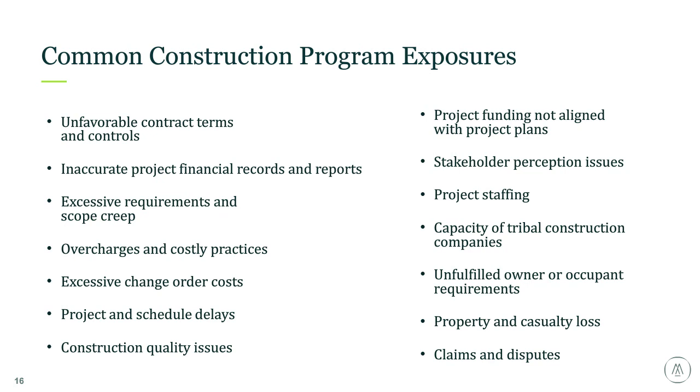So as the students were going back to school, it caused operational chaos to figure out where they were going to house the kids to teach them. Another area I've also seen is where master budget amounts were significantly different than the construction estimates, but only master budgets were being reported to key stakeholders, which created an unreported cash shortfall that needed to be addressed immediately.